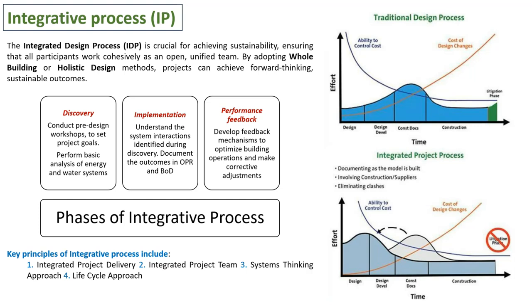But once you lock the design and then look for the green building certification, it's a bad choice. The cost of the changes you have to make for the sake of green building would be a whole different process. For the sake of building construction, you designed something. For the sake of green building certification, you modified and changed the design.